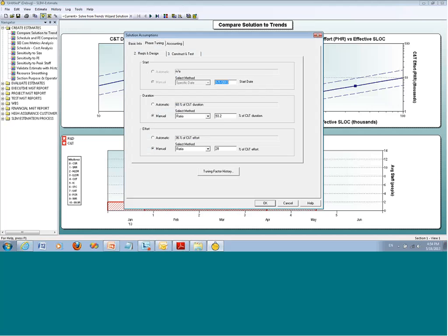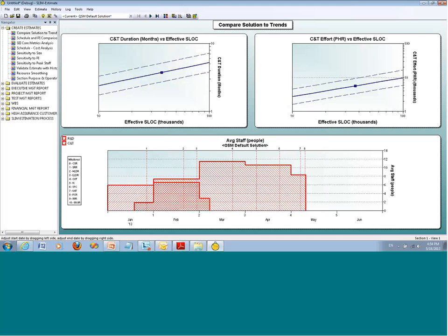So it just so happens that what is in here now came from the trends, but let's say we reset that to 60 and 40 and run it again. We still get phase 3 time and effort directly on the trends, but we get a more traditional looking phase 2. The overlap is still pretty heavy, but the ratios of time and effort are a little bit more traditional.